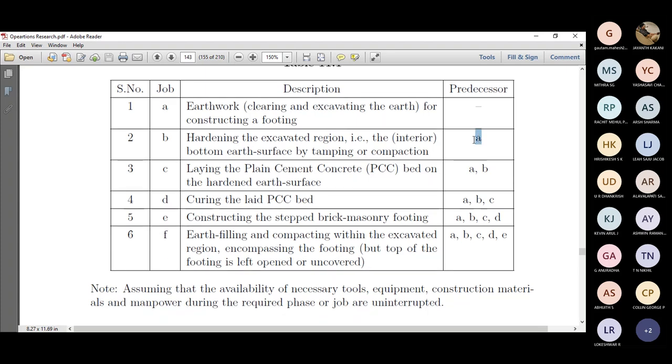Then you can see the predecessors. Just pretty straightforward because B depends on A and C depends on A and B. So this is the entire predecessor. You can find out the immediate predecessor. The immediate predecessor might be B. So immediately before this. And for D, it is A, B, C. But you have to add a duration to it. Like clearing earthwork takes one day, hardening takes half a day, laying a PCC takes one day, curing takes four days, and constructing brick footing may take two days. Then earth filling is just half a day or something.